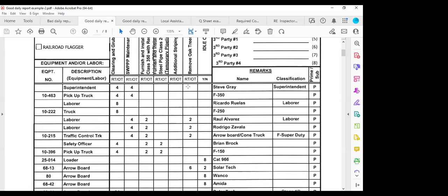So we know how many hours are spent on change orders. Without this information, you cannot make accurate payments, and it could even lead to claims if it is not documented here. When it comes time to pay, contractors expect more, and office people or the resident engineer not having enough information could cause issues, delayed payment, or even potential claims.